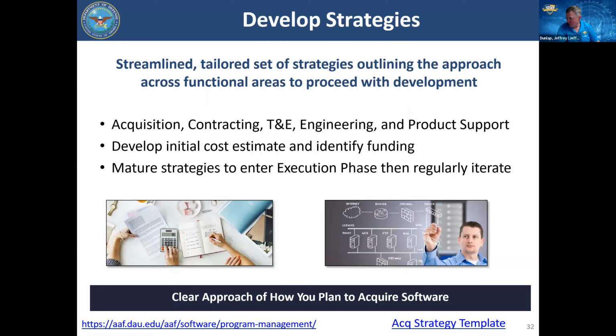Somebody asked, where does the contracting officer fall in all of this? It's a different type of contracting philosophy. Here's my vision of it, the nirvana vision. I need to get a contractor on board to do this work. I think maybe a multiple award contract, a MAC, where I'm able to do task order tasking. It says I have new tasking, I need a contractor to develop this particular piece of software. Okay, we understand that contracting action. If I want a level of effort contract, I award it to a contractor and say I need 25 software developers and a team, and they're on the payroll and they get paid and here's their profit.